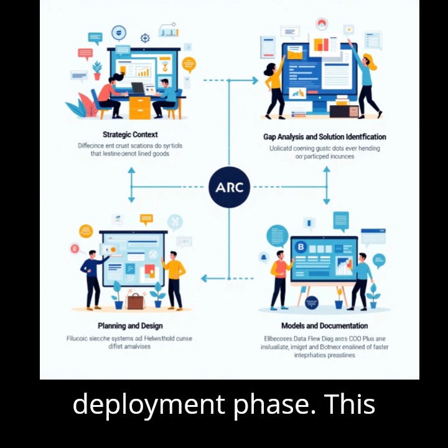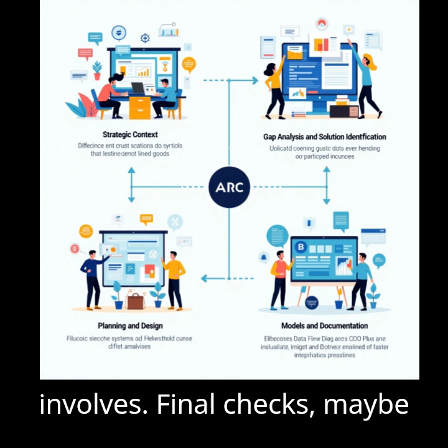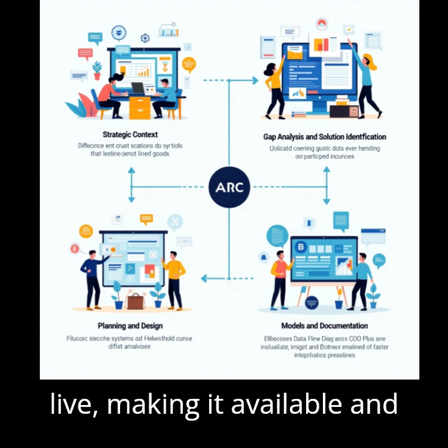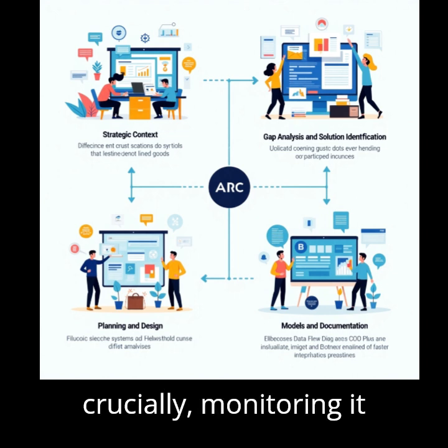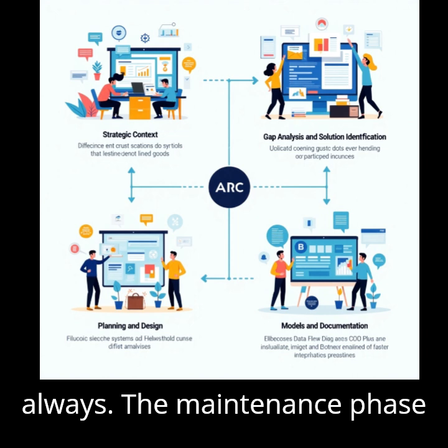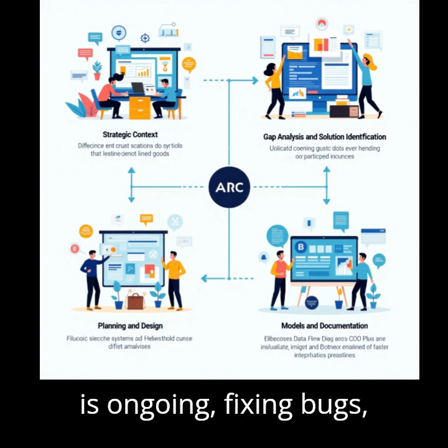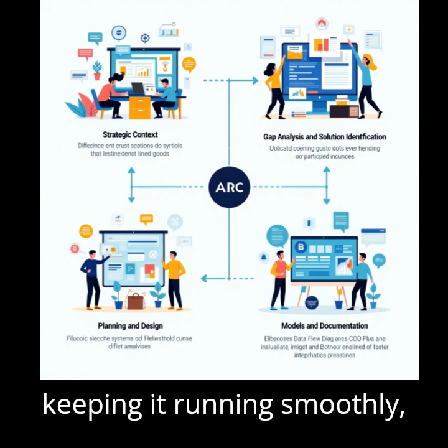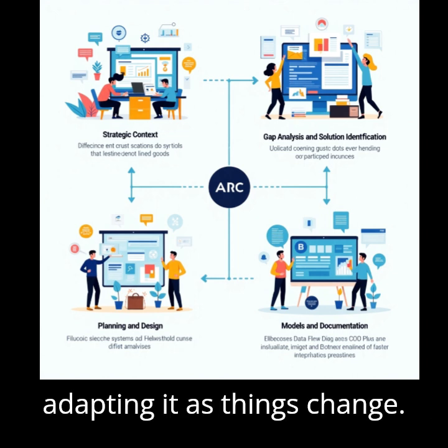Yep, the deployment phase. This involves final checks, maybe migrating data from old systems, then the actual go live, making it available, and crucially monitoring it closely right after launch. And it doesn't stop there, right? There's maintenance. Always. The maintenance phase is ongoing. Fixing bugs, adding updates or new features based on feedback, keeping it running smoothly, adapting it as things change.